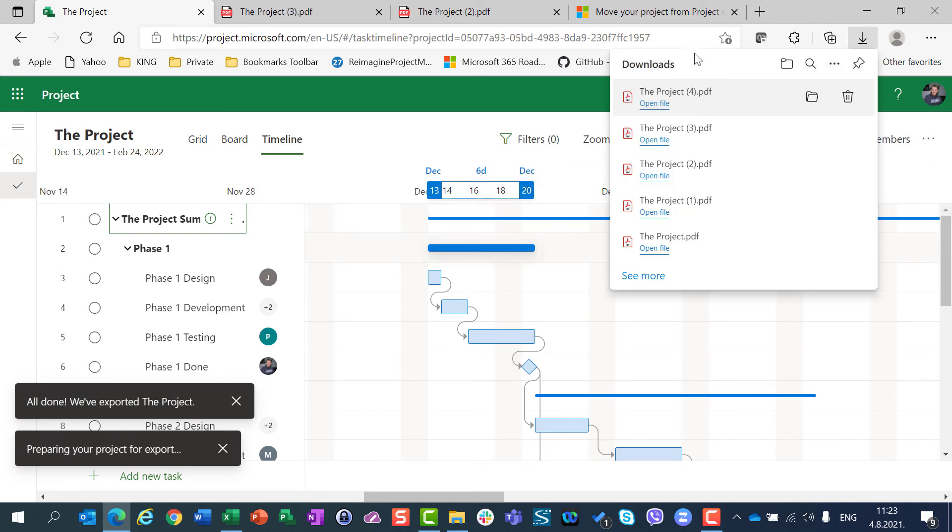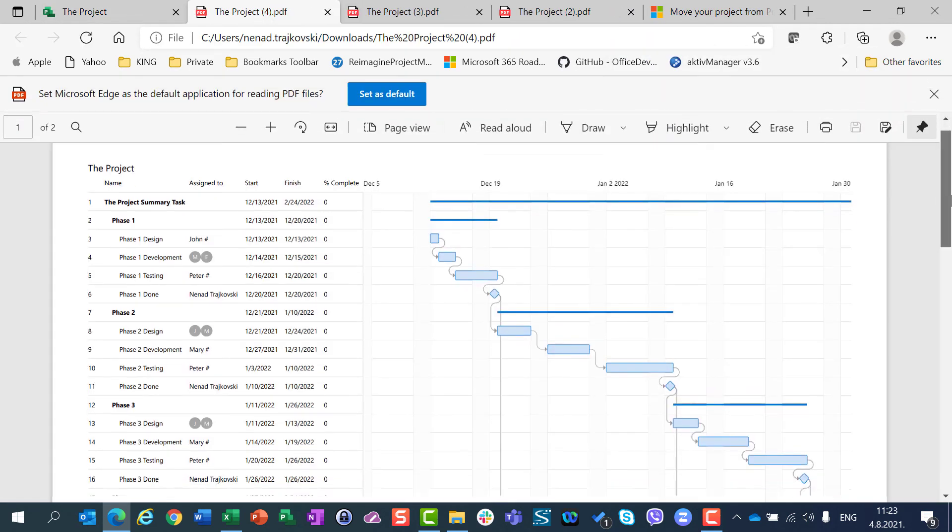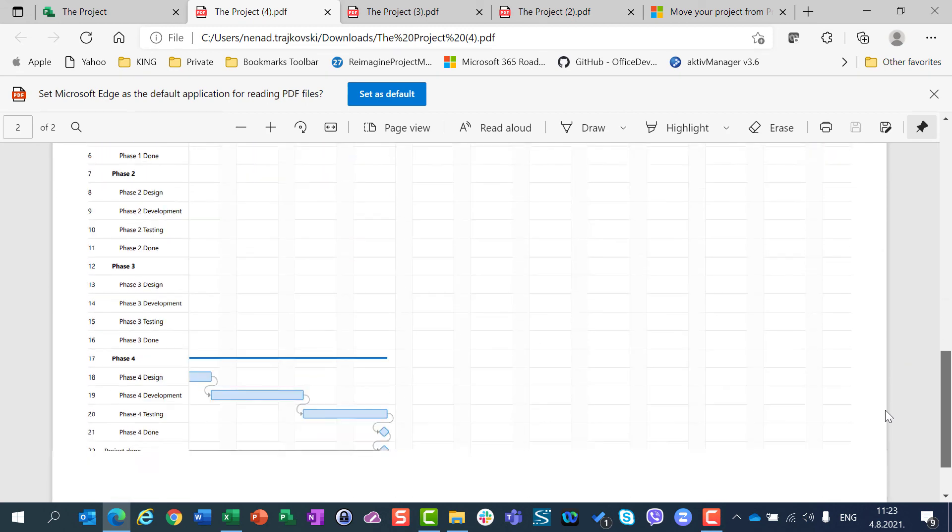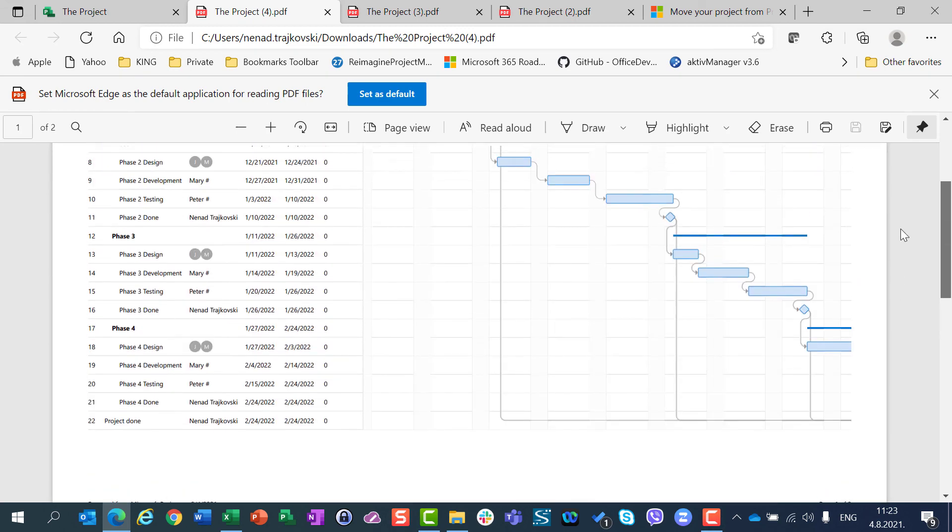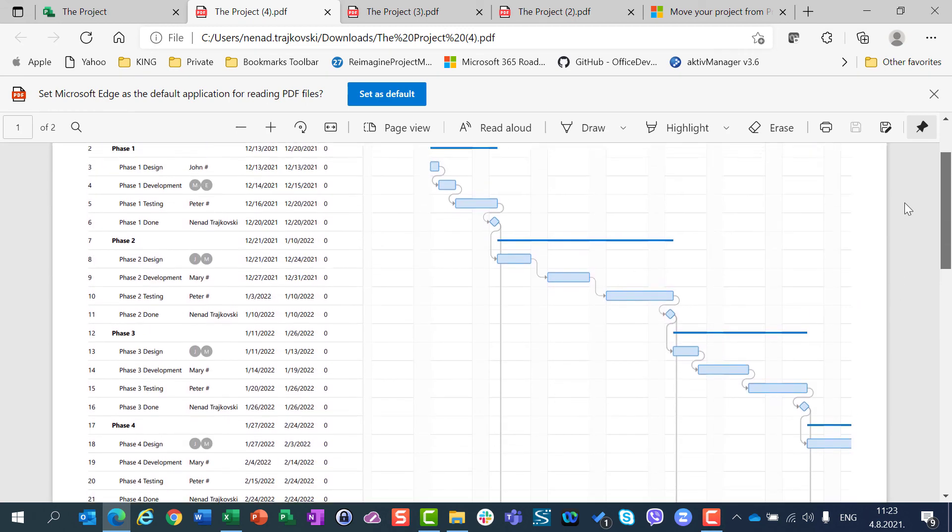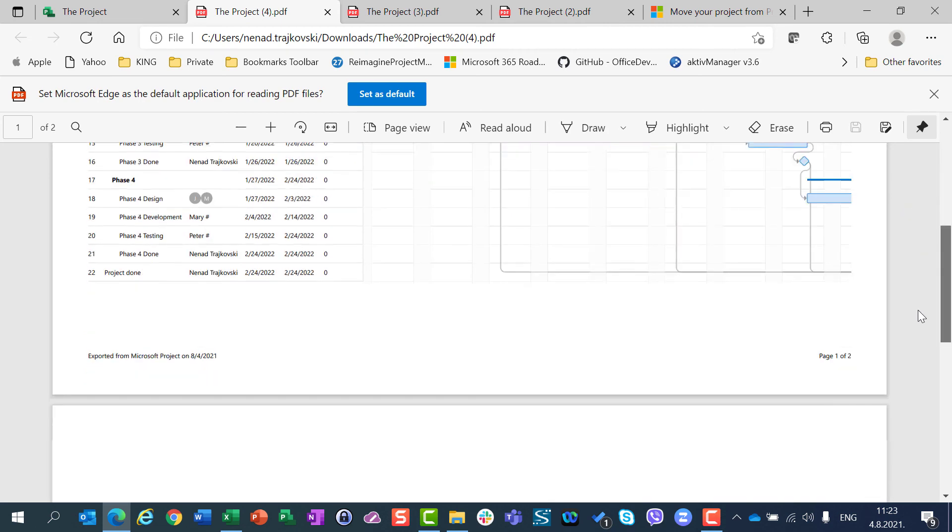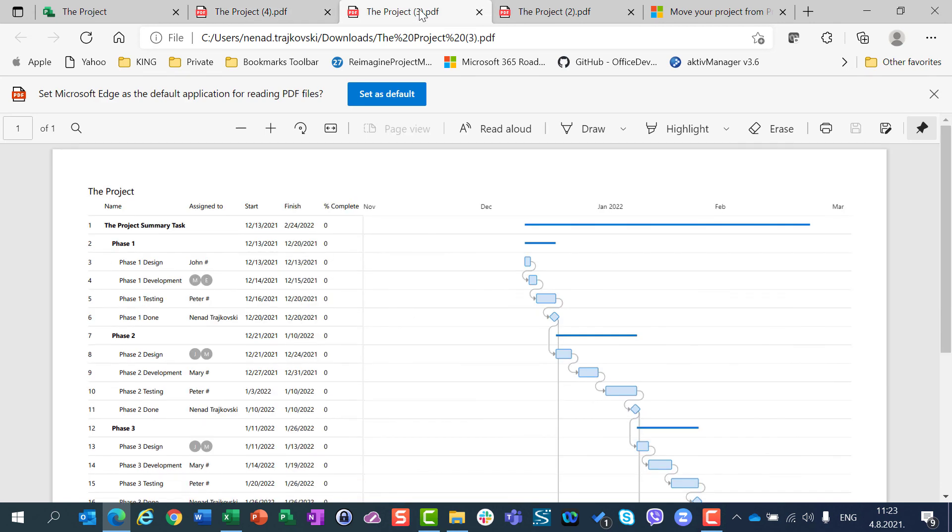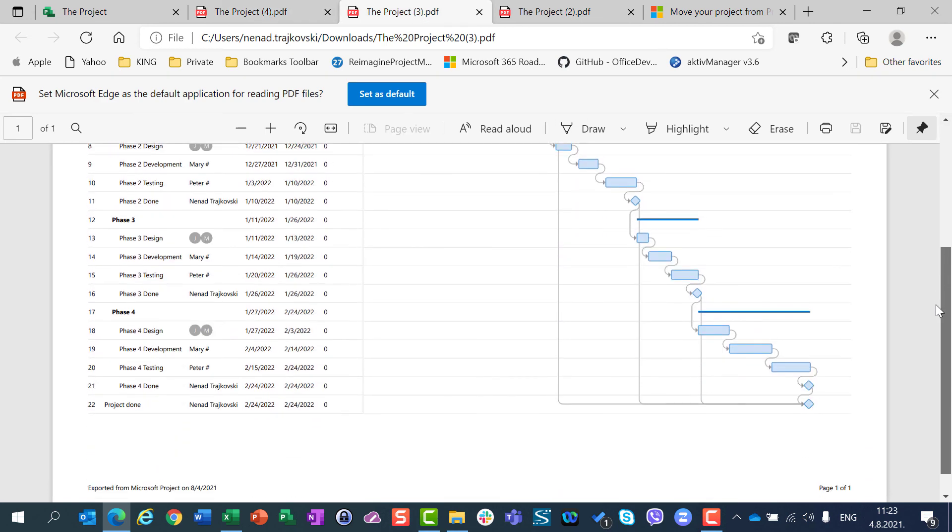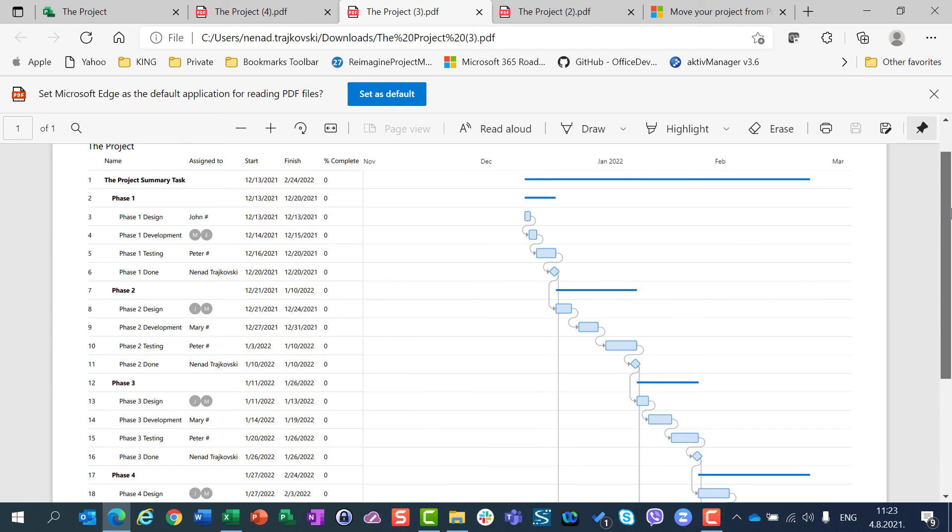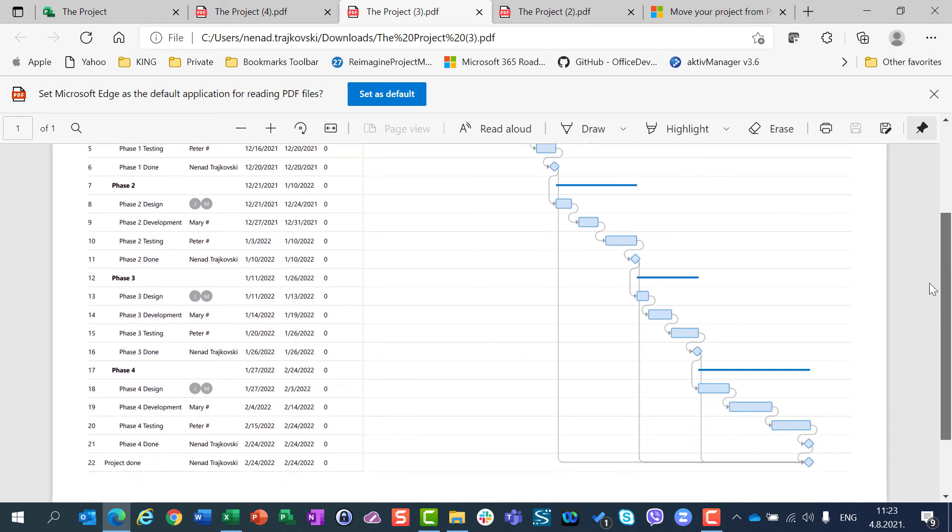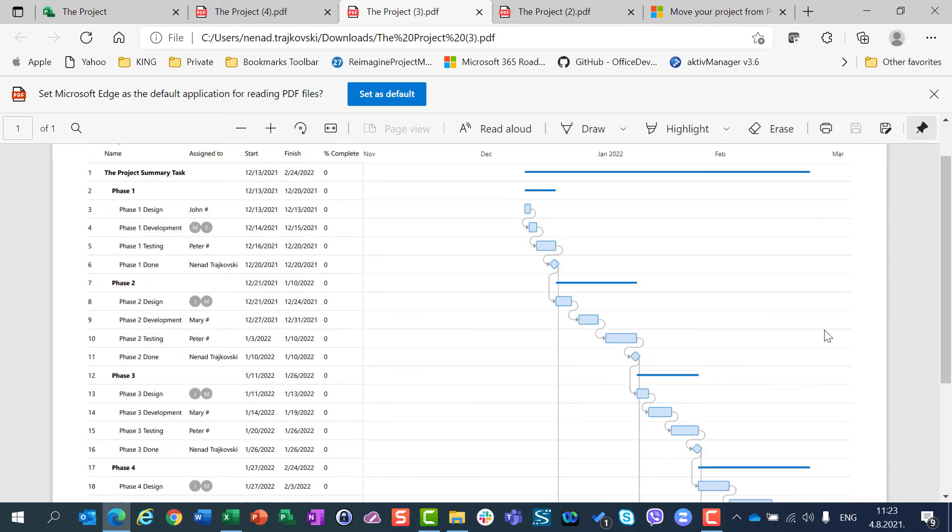And once it's done, you will see that then you have one or multiple pages. In this case, when I have 50% zoom, I will have two pages, but if I go to full zoom out, if the zoom will be 0%, I will get the whole project in one page, which is very useful for me.